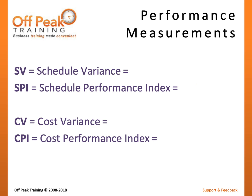Step one is that all formulas begin with Earned Value. This makes sense because the only way to measure actual performance is to know how much work is actually completed. Step two is to use the proper mathematical operator. The word variance means difference, so we will use subtraction for both Schedule Variance and Cost Variance calculations. An index can also be thought of as a ratio, so we will use division for both Schedule Performance Index and Cost Performance Index calculations.